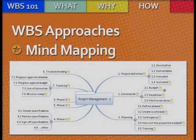Lastly, there is a technique called mind mapping. This procedure is often used during the top-down and bottom-up approaches. Rather than the standard list form procedure, this method involves a core idea which branches out into smaller ideas. It may be drawn or written out in non-linear form. This less-structured approach allows for more visual pictures of the project's scope by defining and grouping tasks. It can release creativity and morale among team members.